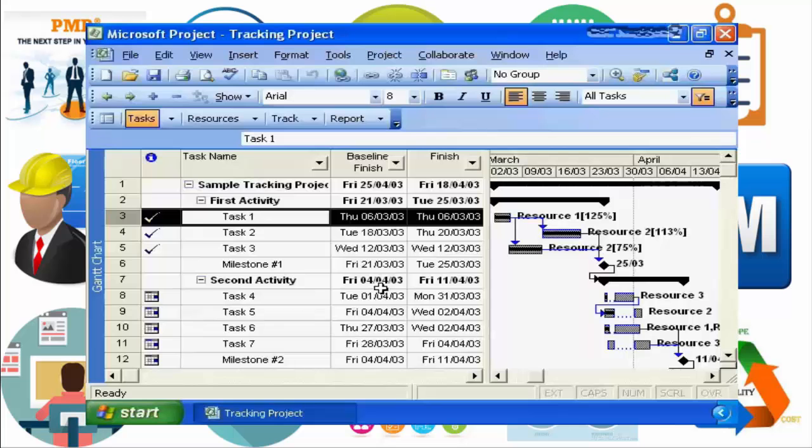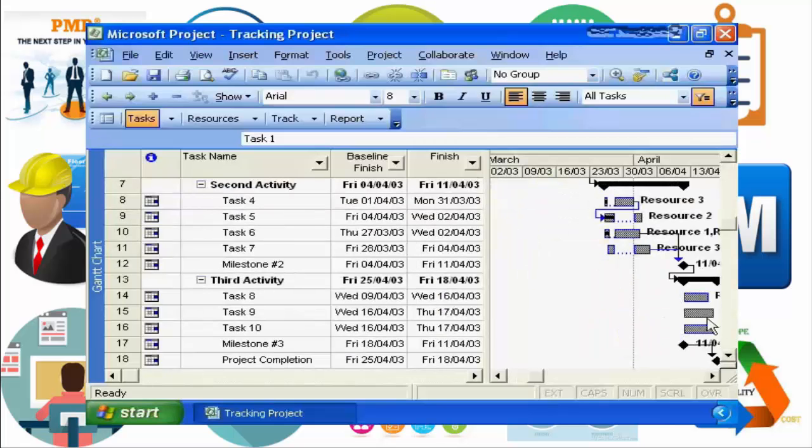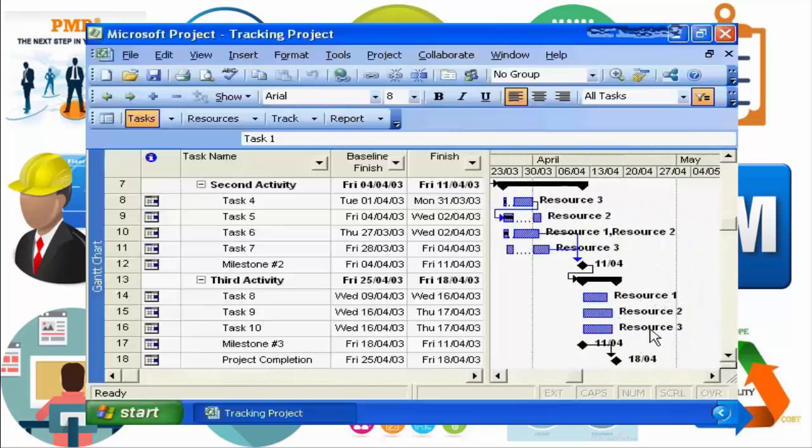You need to manage the data, you need to manage the plan, you need to be as aggressive as possible without introducing too much risk to your project before you go to the project sponsor and say, bad news, the project is delayed. As you saw with a little bit of aggression in Microsoft Project, on this relatively short project, we were able to change our finish date from approximately a week and a half late to now approximately a week early. Yes, by doing these tasks in parallel as opposed to serially, we may have introduced some risk, we may have introduced extra communications channels, but that is a consideration we are willing to manage as the project manager to try to deliver this project on time.